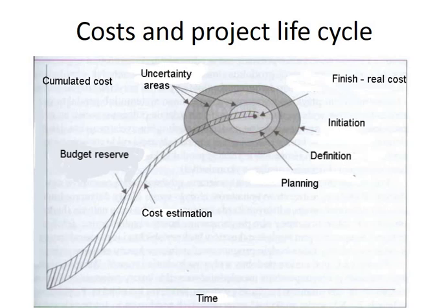You can invest it in something else, which is always a source of potential gain for you. You can think about another project and so on. So the thing about the budget reserve is that yes, you set it at a certain level at the very beginning, but towards the end of the project you can think of decreasing it and moving the money somewhere else.